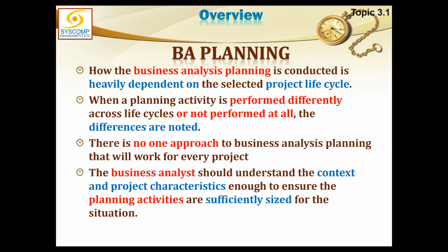The output of it, it's some sort of document or something. Not necessarily. Basically, what will I have? A finished, ready land to start construction with all the permissions available, right? I don't need to seek any permission. So this is the output I desire. And when I get this deliverable, only then can I move on to the next phase, right? What could be my next phase?